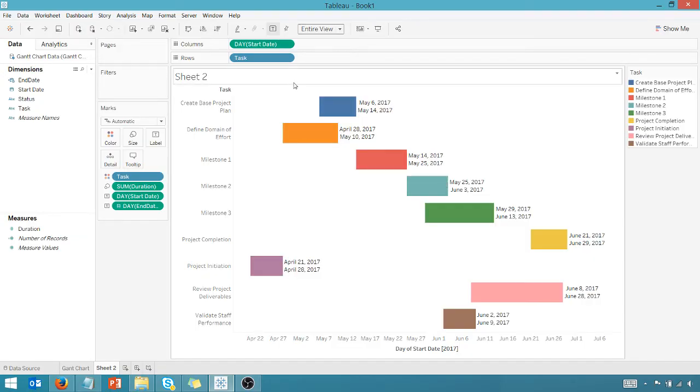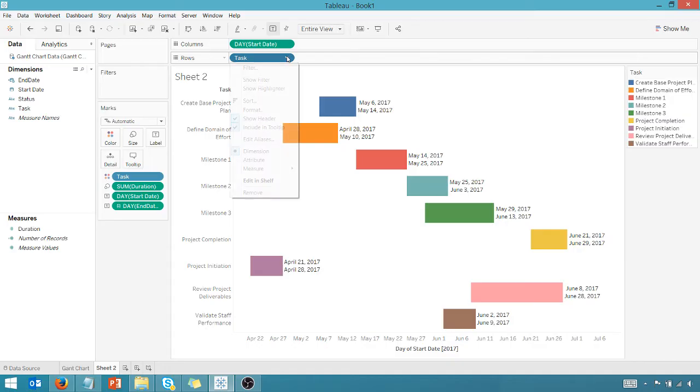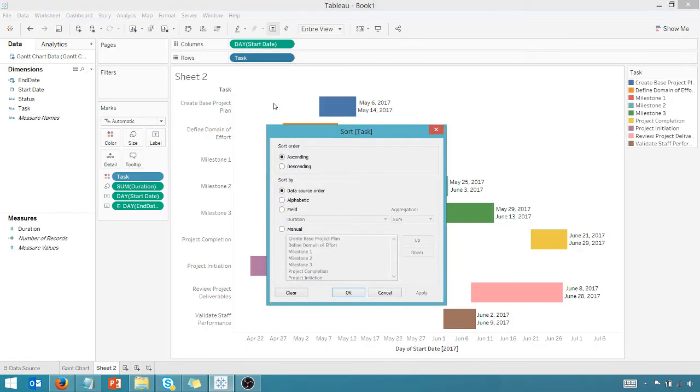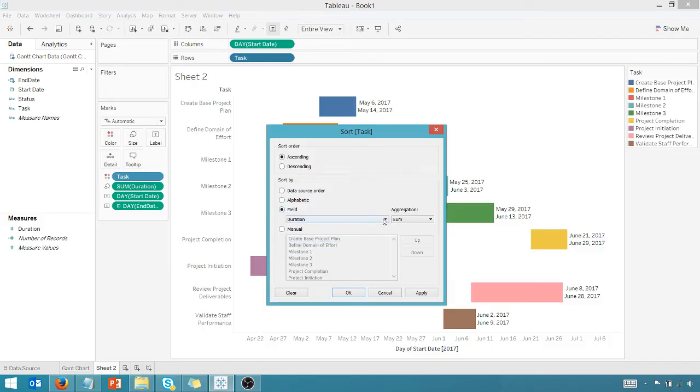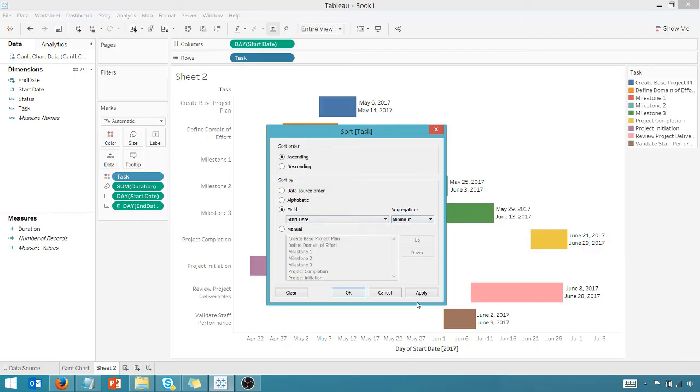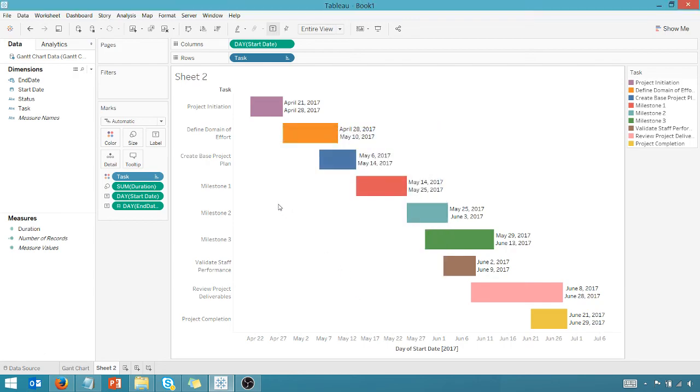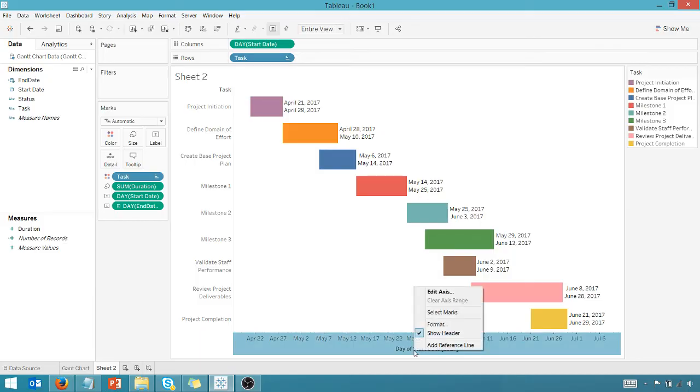So I want to make sure that these are sorted correctly. You can look at this and see that they're not sorted correctly. So if I go here on our rows, we want to make sure we have that sort. Now I can manually sort, but I'm going to go to field and I'm going to make sure this is on the start date and hit the aggregation, doesn't count here, but we'll just pick minimum. We'll apply that. And as you can see, our Gantt chart has come into being here.